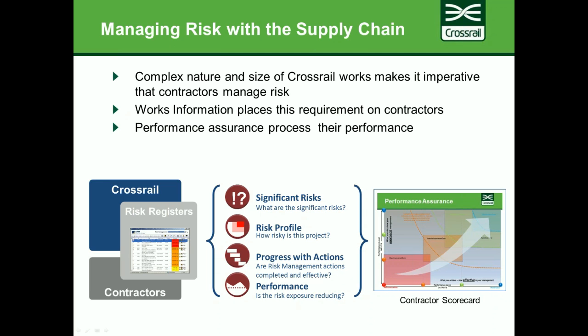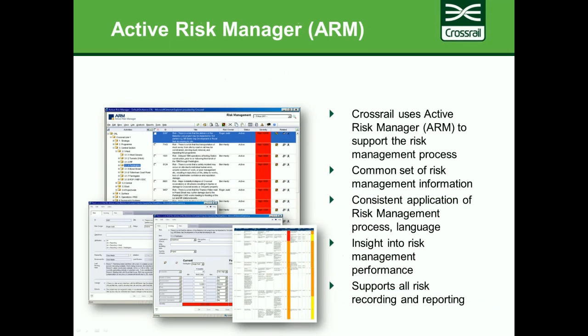We invited our supply chain, our tier 1 contractors, into our risk management database, and we supported their use of it to give us that common approach, and that insight into what their risks were and what they were doing to manage them. And all of this, as we've already said, was around our Active Risk Manager, our risk management database.